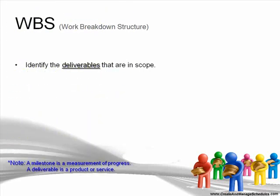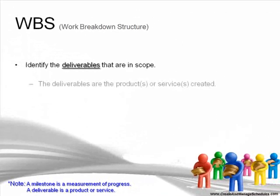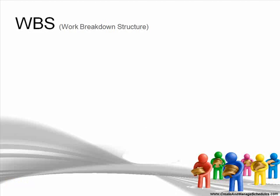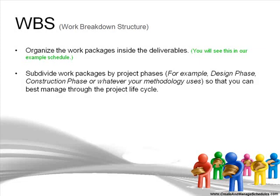Identify the deliverables that are in scope. A milestone is a measurement of progress, and a deliverable is a product or service. The deliverables are the products or services that you create — for example, a design document, technical specifications, etc. Organize the work packages inside the deliverables. Subdivide work packages by project phases — for example, design phase, construction phase, or whatever your methodology contains — so that you can best manage through your project lifecycle. Make sure that the project phases are clearly separated by one or more deliverables.